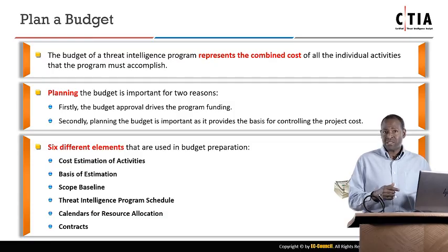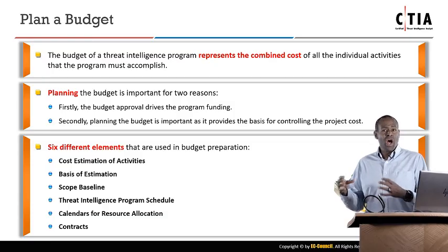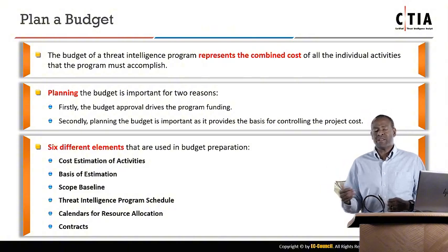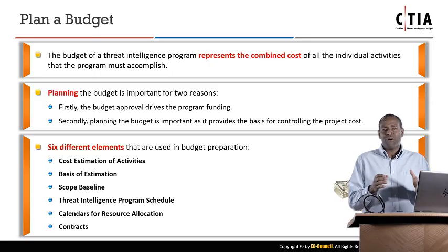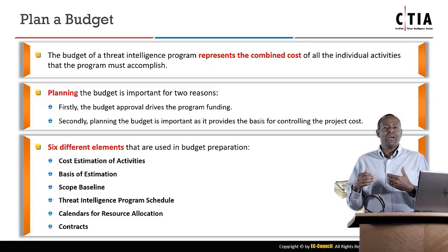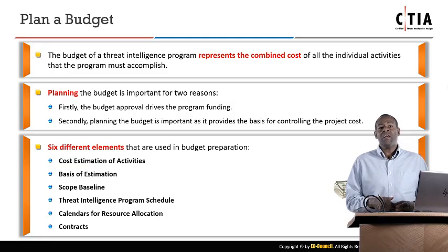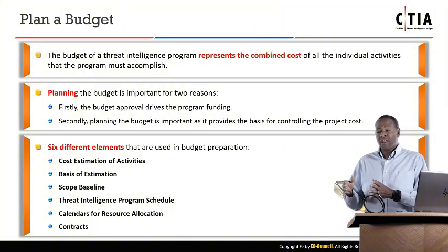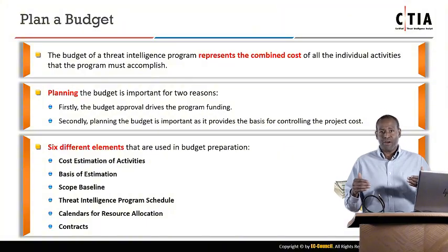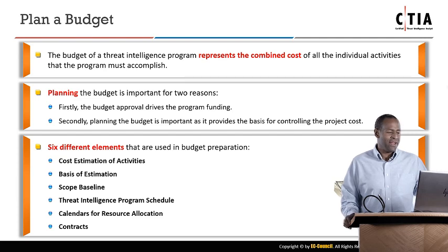Also, a lack of a budget can cause the project to be longer, meaning you need to spend more money, right? So I have the developer for 3 months, and it turns out we no longer have budget for that developer. Well, now I have to engage a less expensive developer, maybe go overseas. That's going to take more time, lengthening that specific task and the project, meaning we're going to have to pay people longer. You see how it goes. We need to keep everything as close to the plan as possible, and one of the primary ways of doing that is by having a good budget.